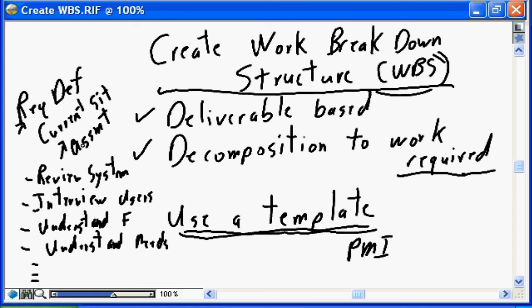With the work breakdown structure completed, you will present that to senior management, you will present that to your project sponsor, and you will say, based on this work breakdown structure, if I complete all of the work defined in this breakdown structure, will this A, satisfy the statement of requirements, the scope statement that has been produced, and more importantly, if this work is produced, is this your expectation of the work that I need to undertake as part of the project to achieve the business objectives for which this project was initiated? In other words, if my project successfully delivers the work defined in this work breakdown structure, will it address your business requirements?